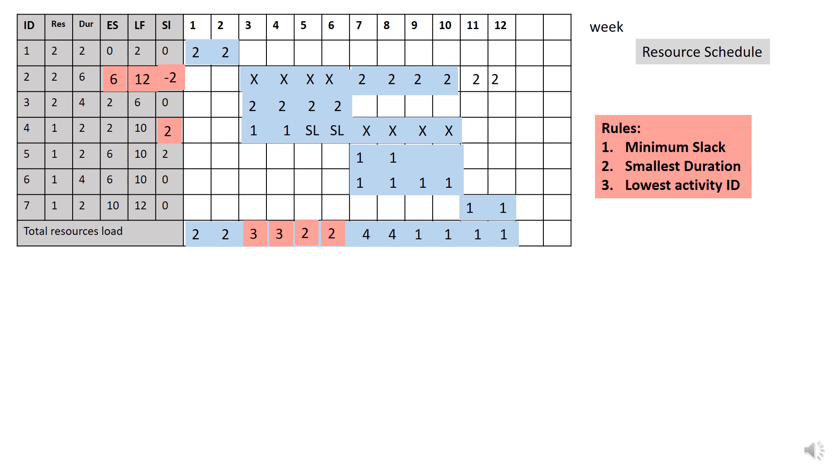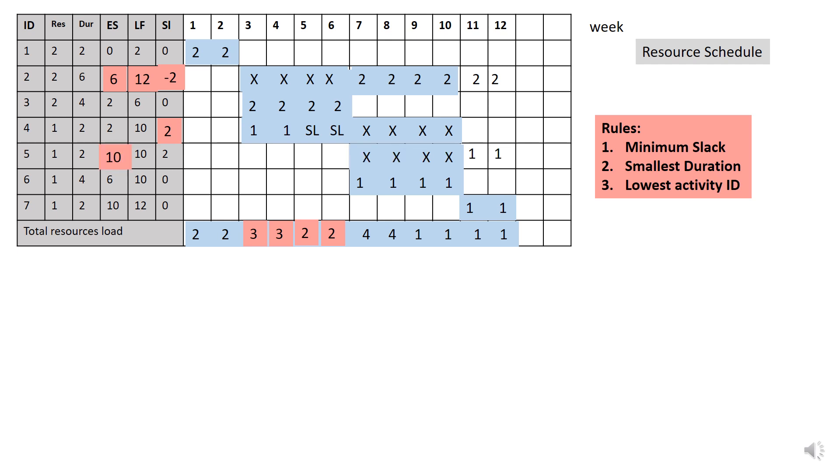So the next activity also has the same status. Rule 1 still applies for this case, so to identify the minimum slack. In this case, activity 6 is 0. You can just load activity 6. And for activity 5, you need to shift the start time until total resources is not more than 3. In this case, the new early start for activity 5 is at week 10 and late finish is at week 12. Since you have shifted to the next 4 weeks, thus the slack has become negative 2.